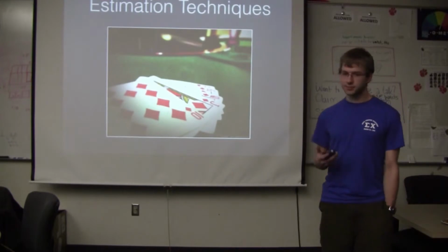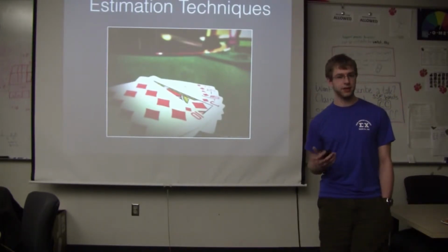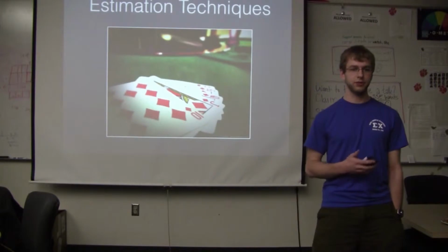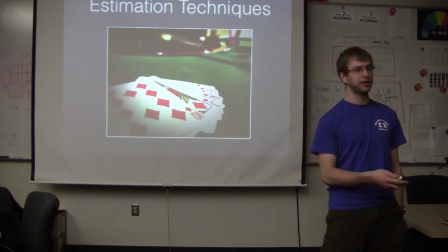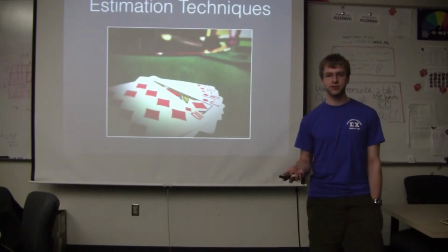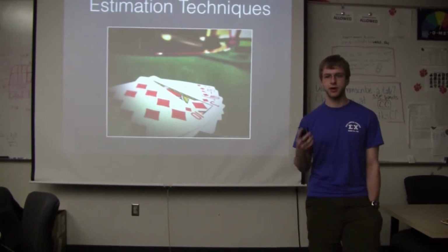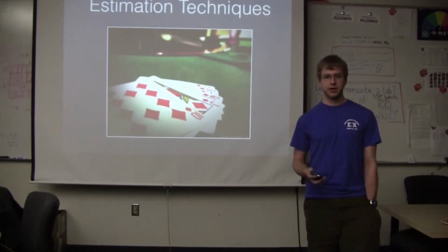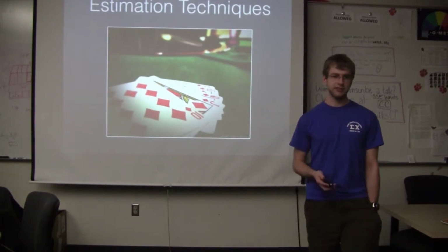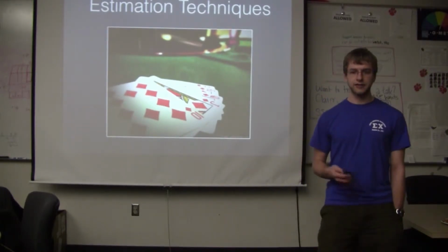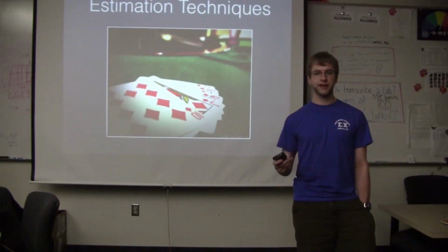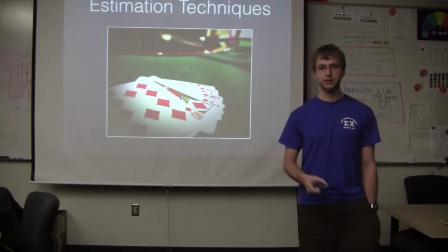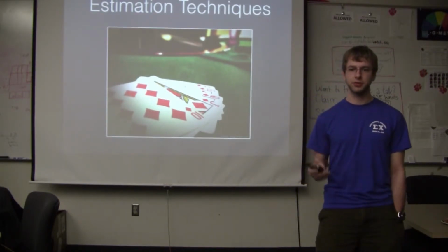So there's a variety of different estimation techniques you can use. The biggest one, I think, is planning poker. I like it the most. I've used buckets like 1 hour, 2 hours, 4 hours, and 8 hours, which are tasks that can be completed in less than a day. Good reason for this is when you're talking with companies and you want to know what exactly you've got left to do. You can sit down and be like, well, that's not really going to take me a day, maybe 4 hours. I'll have it done by lunch. And then additional tasks that take longer than a day can be 2 days, 3 days, 5 days, and 10 days, and those are obviously broken down into smaller tasks that are more manageable.